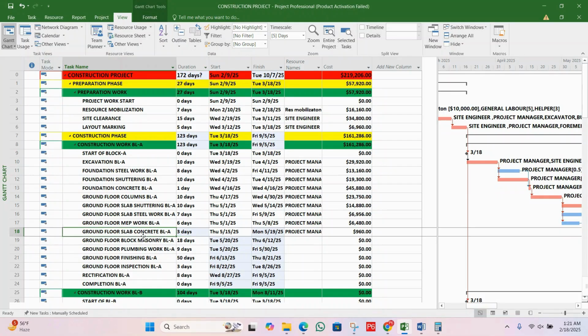It means on the back end we have one project manager, and we cannot assign three when we have one, for 1 day. You can see, when I increase the duration, the over allocation will also be automatically removed.